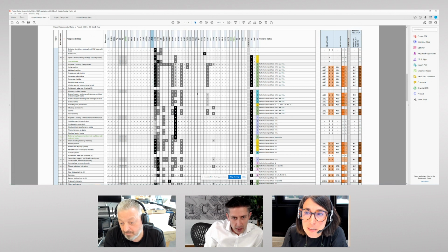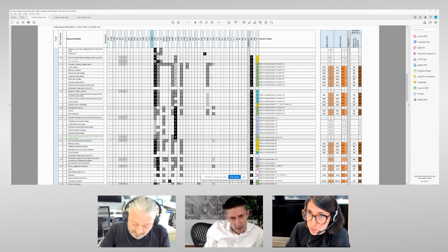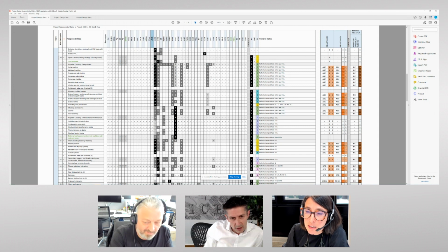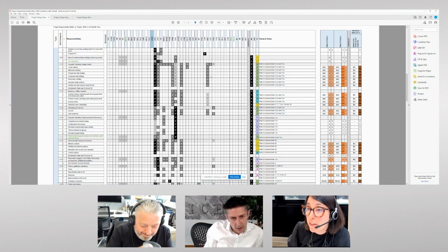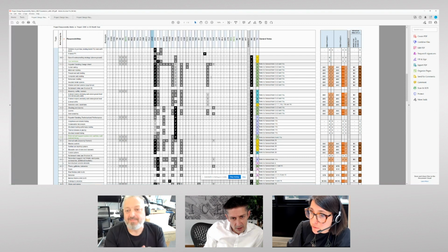Exactly. And it's important to get this agreed prior to going into tender so that the contractor, when they come on board, is also aware who has taken responsibility for different elements of the project and therefore what they are expecting from the specification, whether they're going to get a descriptive or a prescriptive specification.